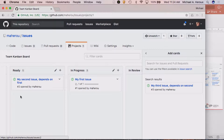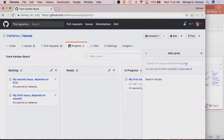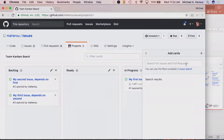Can I put this second issue into the ready column? Based on the principles I taught you — you're shaking your head no, that's correct. Why? Because the only thing that can go into ready are things where the work is scoped and I know exactly what to do. But because this issue depends on the first one, I can't put it there — I actually have to move it to the backlog queue. In a real database you'll have hundreds of issues; in Trilinos we always have right around 540 open on any given day.